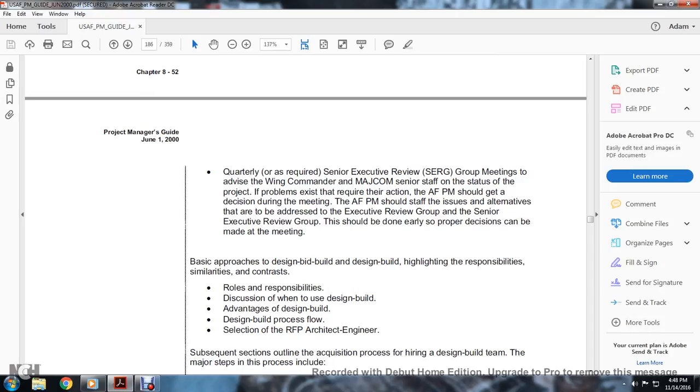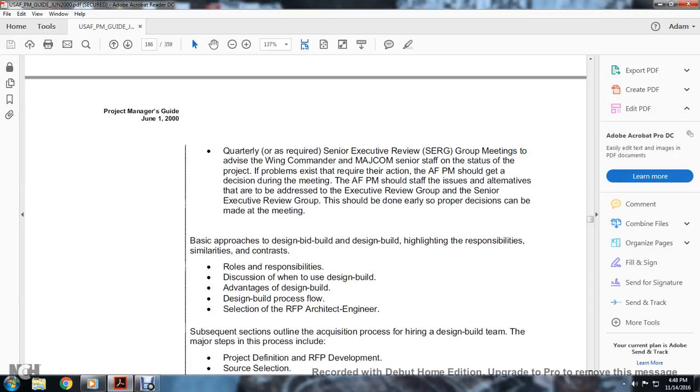Quarterly senior executive review group meetings are required to advise the wing commander and the major command senior staff of the status of the project. If a problem exists that requires action, the Air Force program manager should get the decision during the meeting. The Air Force program manager should staff the issues and the alternatives being addressed. The executive review group and the senior executive review group should be briefed early so that proper decisions can be made.